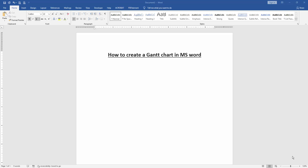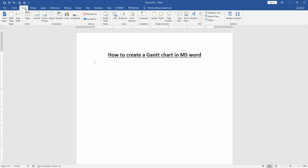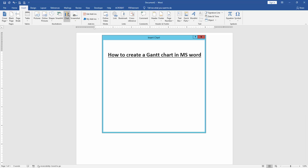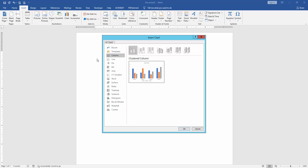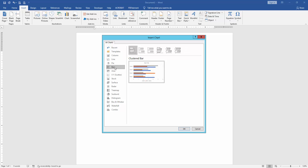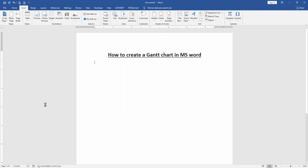First, we have to open a Word document. Then, to create a Gantt chart in this document, go to the Insert menu, then click the Chart option, then choose the Bar chart, then select Clustered Bar and click OK.